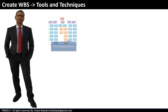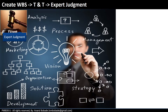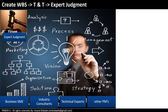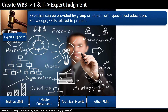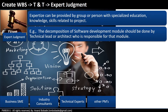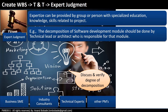Tools and techniques are decomposition and expert judgment. Can a project manager perform decomposition on his own? In general the answer is no, and he should not. Decomposition should be done by experts — business SMEs, industry consultants, or other PMs who have done a similar project in the past. Expertise can be provided by a group or individual with specialized education, knowledge and skills. For example, decomposition of a software development module should be done by the technical lead or architect responsible for that module. Experts can help discuss and verify the degree of decomposition and define WBS components and work packages.